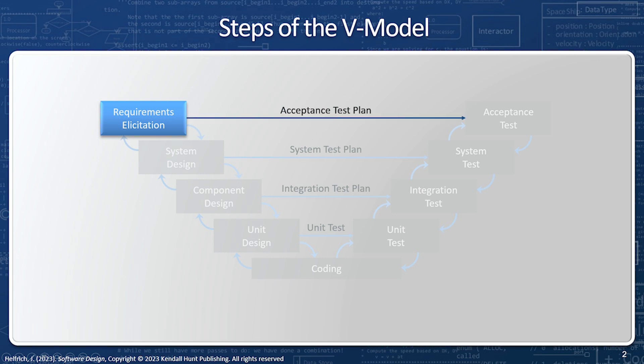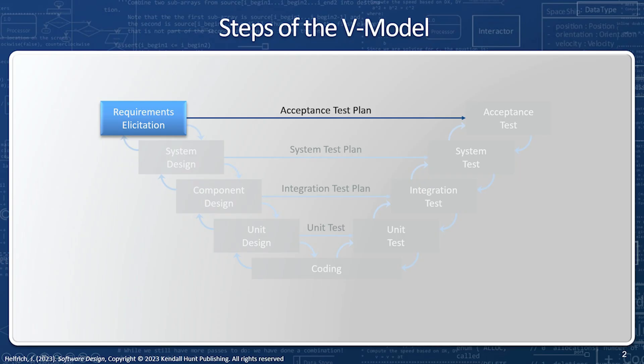One of the main deliverables from the requirements solicitation step is an acceptance test plan — namely, how do we know if the product is fit for use? From our initial requirements solicitation process, we're going to have a preliminary acceptance test plan. Note that as we revisit the requirements solicitation step again and again, our understanding of what needs to be built is going to be elaborated upon, and so our acceptance test plan is going to be added to. The important thing is to have one location where we store our complete understanding of what needs to happen for the product to be fit for use, and that place is the acceptance test plan.